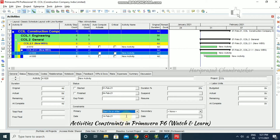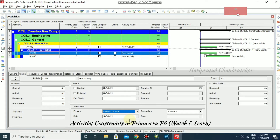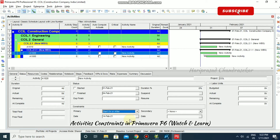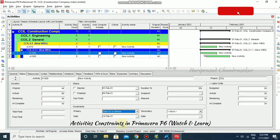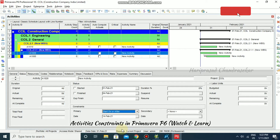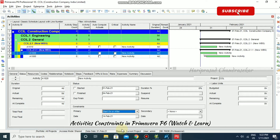For start on or after, you can select a date. It is also a restriction that you impose on a particular activity that limits the earliest time it can begin — it can't begin before 14th Feb, it can start on or after 14th Feb. When calculating a schedule, the start on or after constraint is used in the forward pass. For start on or before it is a backward pass, and for start on or after it is a forward pass. This constraint affects only early dates — the early start date of an activity with this constraint can't be earlier than the imposed date.